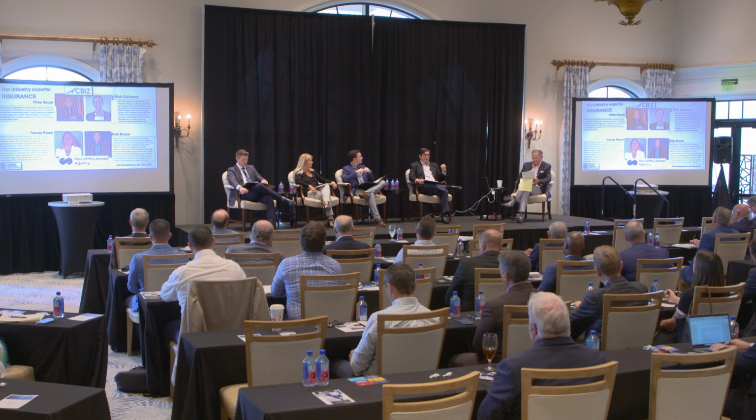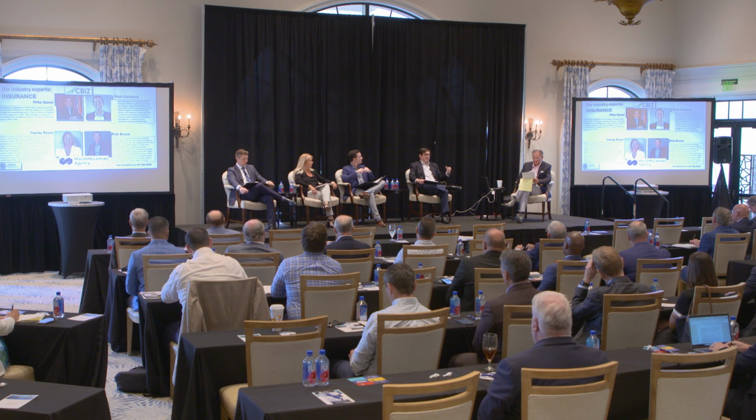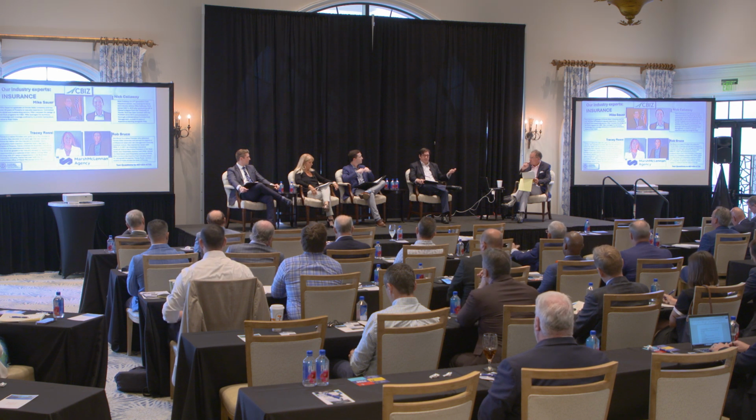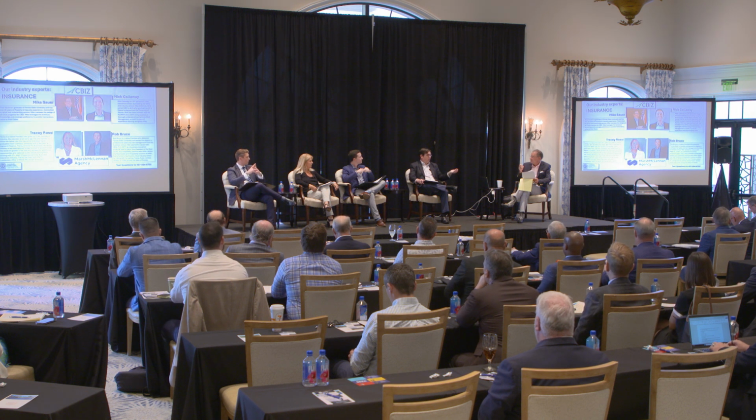Other exclusions, the one thing that we always talk about is hard costs, the construction costs. Your soft costs are something that are not typically covered under your project value. So what's a soft cost? That's the cost of additional insurance if a claim occurs, the cost of additional architectural fees, permitting. So we want to make sure that we separate that out onto a separate policy endorsement or sublimit, so it is covered, because typically it's not covered under the hard cost.